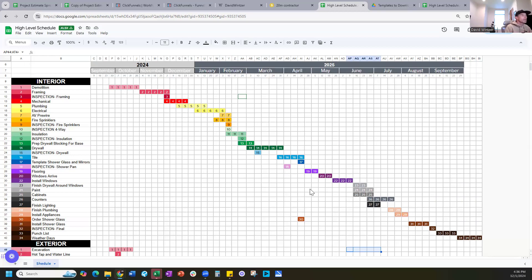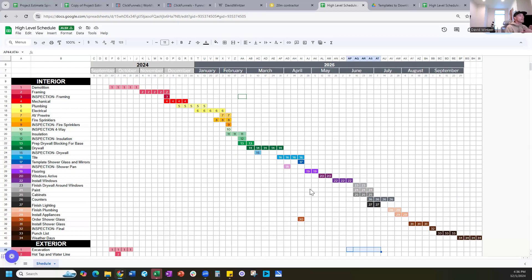If you tell your superintendent or project manager this needs to be done in 12 months and they agreed, you track every single month: are we still hitting 12 months? It's also a way to assess performance — if over the past six projects someone has delivered every one of them four months late, that's 30% over the estimated schedule. Compare that to someone who consistently comes in one month under. That historical data tells you a lot about your team.